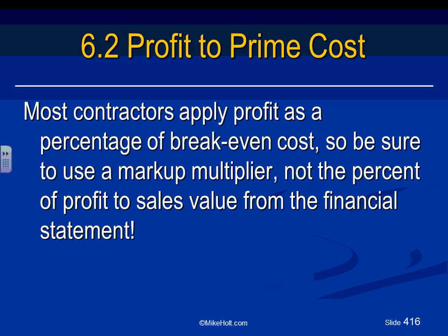When you have a break-even cost, guys, right in here, you need to assign a multiplier, a percentage, to get you the profit. There's something called profit to sale. That's your percentage of profit, guys. But when you apply it to the break even, it's different. I don't know if you ever paid attention to it. There's markup multiplier and profit sale. Long story, gentlemen, when you have a 10% profit on your overall sale of a project, that's more than 10% when you apply it to the break even, right? Because your break even is less.